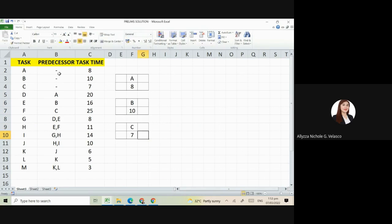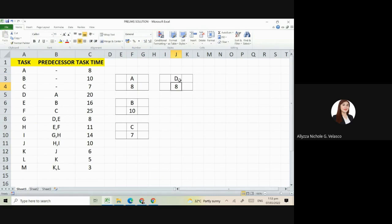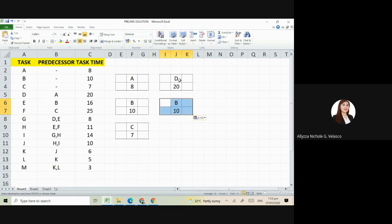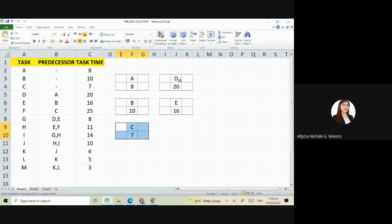Next is letter D. Its predecessor is A, having how many days? We have 20. Then letter E is B, so we'll place it here beside D, having how many days? 16. Next is F, its predecessor is C, so we'll place it here, having 25 days.